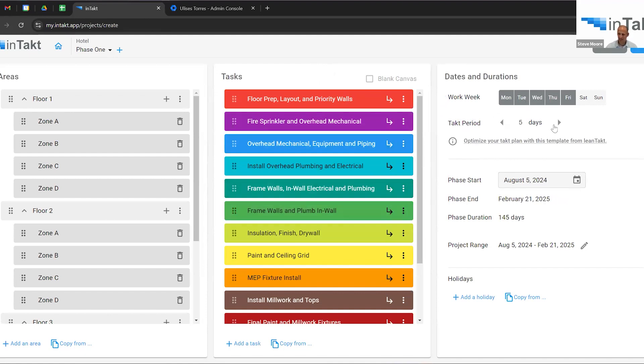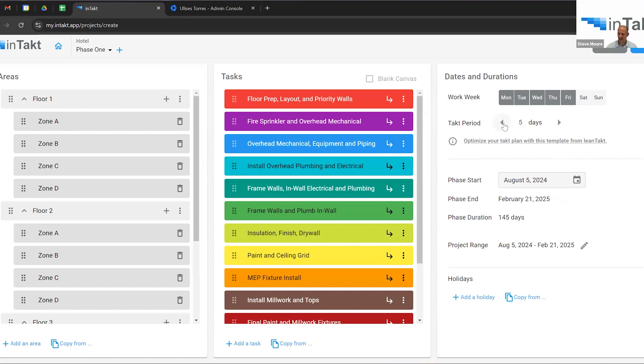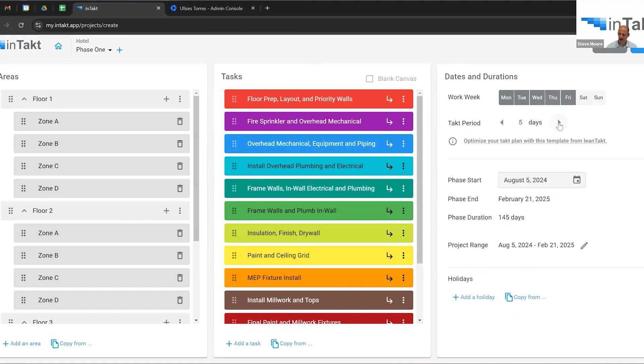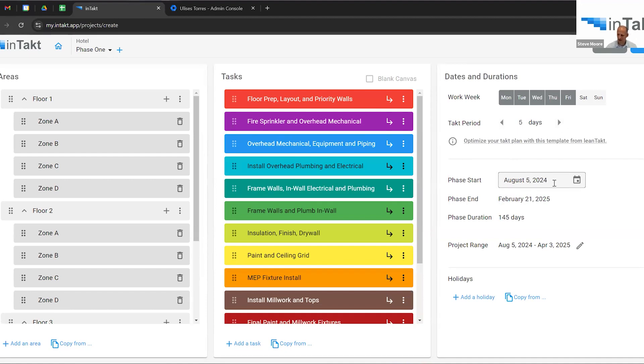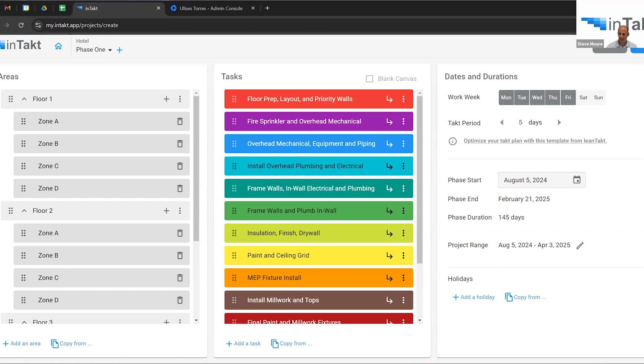And then for the dates and durations, I can choose which days of the week are work days. Let's stick with a Monday through Friday. It's a classic. And a tack period. How many days we want the standard rhythmic tack period to be. Then we have our phase start date. We can put holidays in. All that good stuff. I'm just going to hit save.